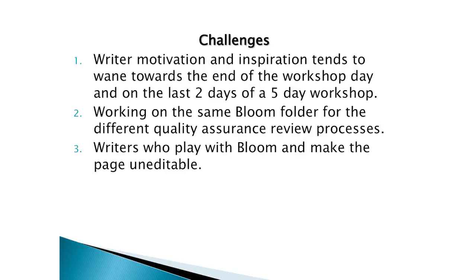So that's a challenge. And then another challenge we encountered was working on the same Bloom folder for the review and quality assurance process. Because if you're not working on the same Bloom folder, there's a tendency that a book has been reviewed in one folder and it's unreviewed in another folder. So there's the need to make sure that you're working on the same folder so that you don't have different versions of the book in different places. So that was a challenge as well.